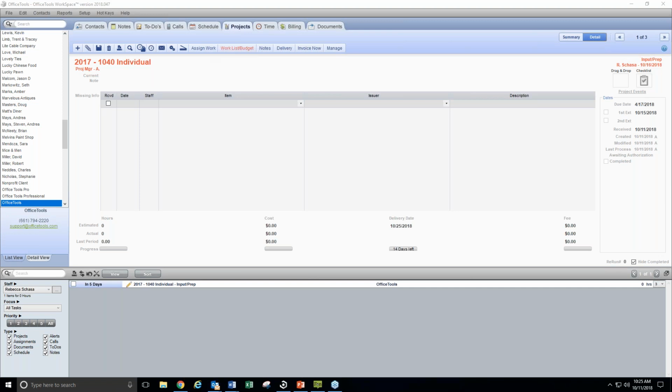The next question that we have here is about holidays and how the due dates change within OfficeTools. That is set inside the definition. So this specific question says if there's a holiday, OfficeTools changes the project due date for the week with the holiday, but it doesn't switch it back. And that is true. There's no real way for us to note that because in a weekly project or a biweekly project or a monthly project, unless you have it broken out, it is rolling forward weekly or monthly or biweekly. So the due dates are not stored anywhere. We have nothing to refer back to.